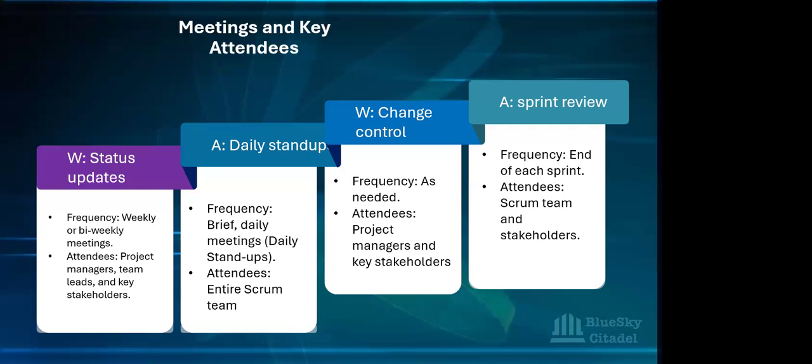So with this one, these happen daily. This is a brief daily meeting where each team member shares what they accomplished yesterday, what they plan to do today, and any blockers they're facing. Those are, I'm going to say, the OG, the original questions you ask in a stand-up.